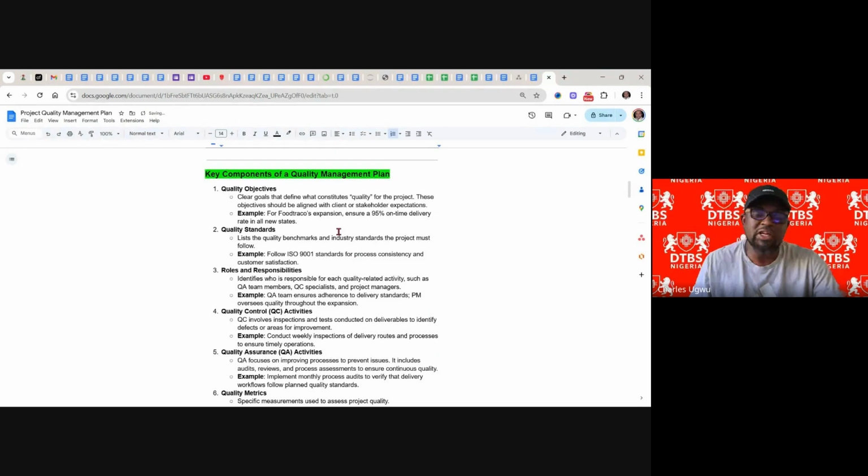Good. Looking at this example here for Foodtrackle expansion, Foodtrackle is a food delivery company that wants to expand to other states of Nigeria. Looking at Foodtrackle expansion, what they call quality here is 95%. Anything below 95% is below their standard. That is quality. The expansion must ensure a 95% on-time delivery rate in all new states. They've given you their benchmark.